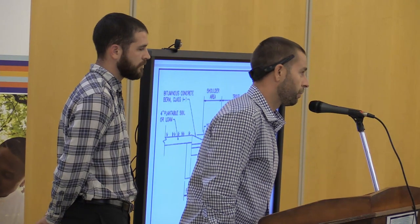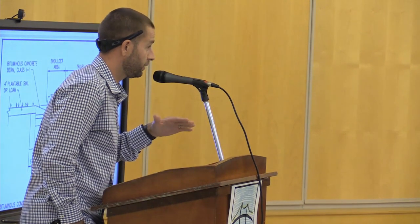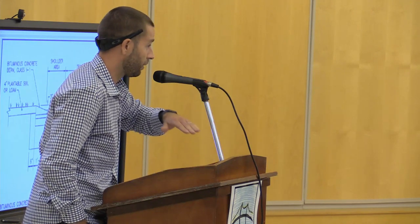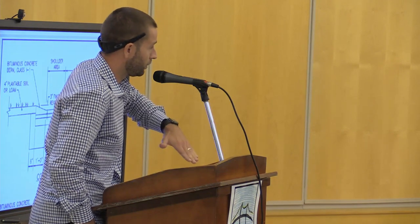So I received this verbally over the weekend from our site subcontractor. We can chamfer the edge, and if we chamfer the edge, there's not a cost increase, supposedly. Again, that was verbally, so I need to follow up with that. There are definitively completely scoped granite curbs. That increases the cost. So chamfer, more than likely not, 99%, just need to confirm. Slope, definitively.